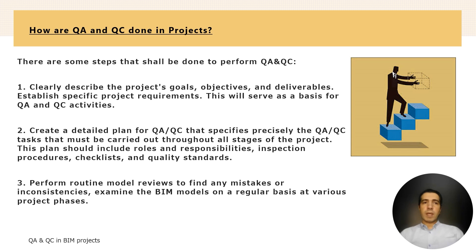You have to establish specific project requirements, because this will serve as a basis for the QA and QC activities. Second, you have to create a detailed plan for the QA and QC, which specifies clearly the quality tasks that must be carried out throughout all the stages of the project. This plan should include roles and responsibilities, inspection procedures, checklists, and quality standards.